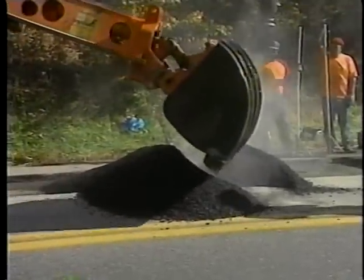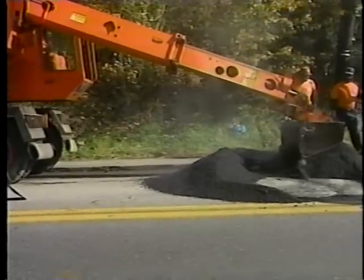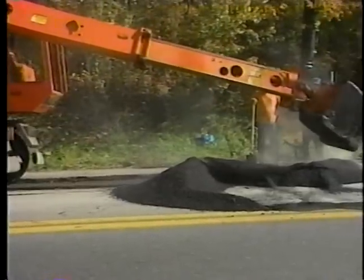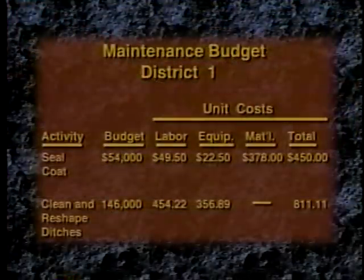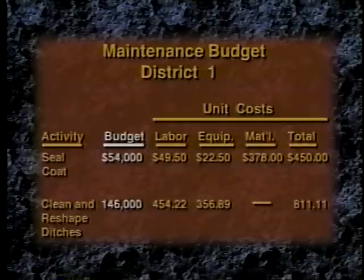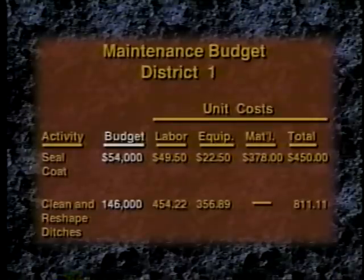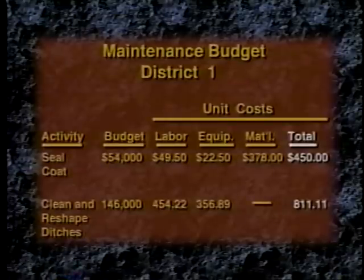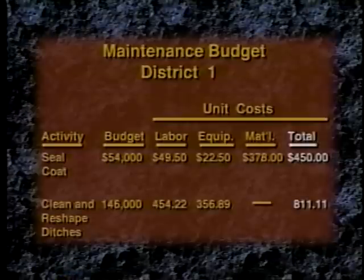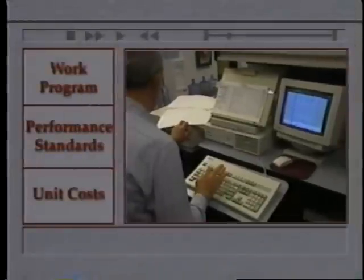To create a performance budget, managers must know approximately how much of each activity should be done, how much resources are required, and how much resources will cost per unit of work. They must estimate the cost of maintenance work and indicate the amount of approved funds available. The organization's accounting and reporting systems must track information at the right level. Managers base their performance budget on the work program, performance standards, and unit costs for manpower and equipment.